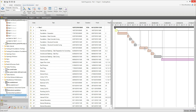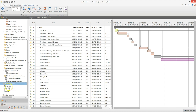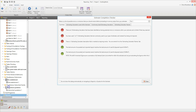Why not spend a few moments looking at the reports produced by BuildingWorks. Note that to ensure the dates display correctly on your reports you first need to set up the build program. Click reporting on the project explorer. The estimate completion checker dialog box pops up prompting you to check your estimate — it helps ensure that you haven't missed anything or made any errors. The traffic lights on the left hand side highlight any potential issues with the estimate. Click close for now.